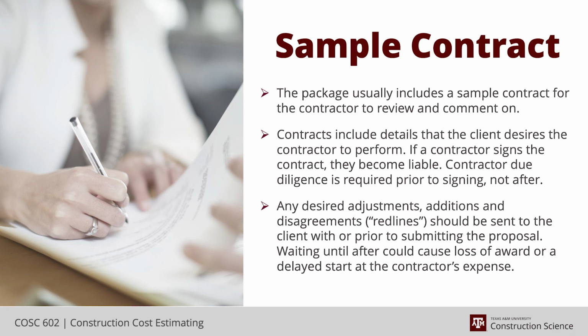There have been times I've seen where everybody held back and didn't start commenting on the contract until we were about to receive the award. And at that point, the client was irritated. Well, you didn't let us know there was a problem until now, and we're in the process of finalizing negotiations. That caused them to step back. In a couple of cases, it caused us to lose the award.